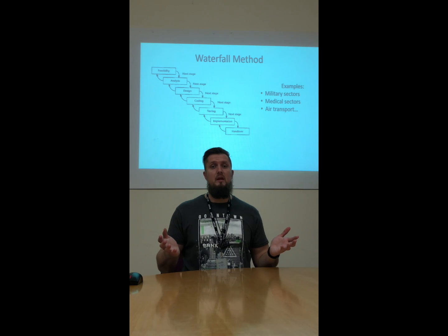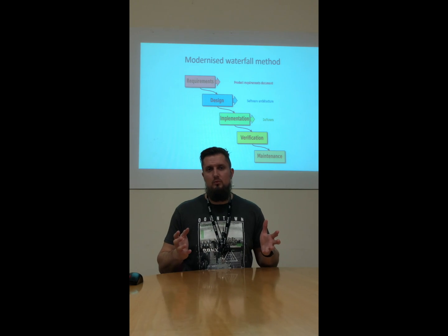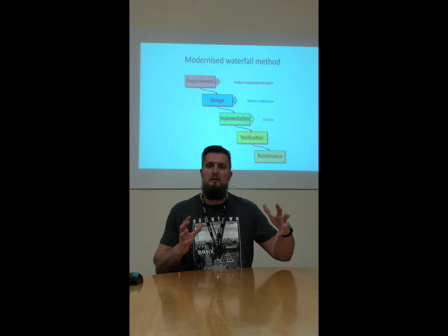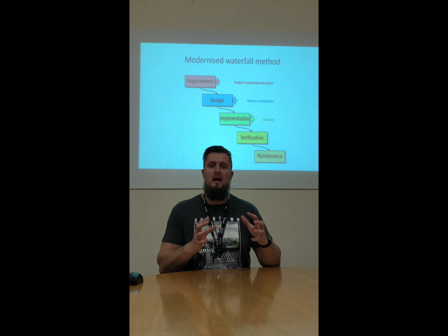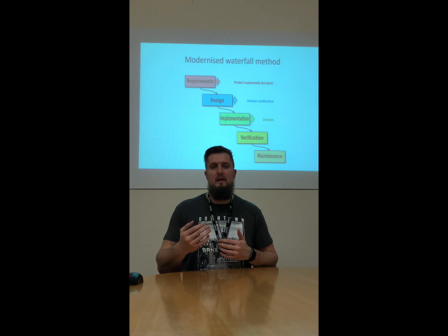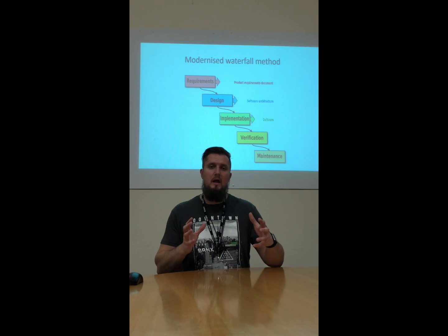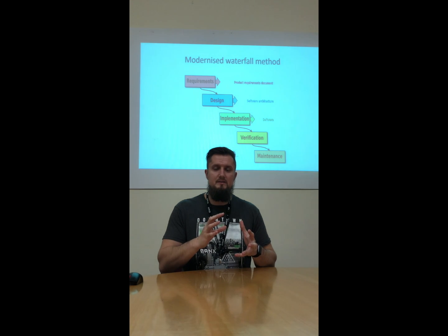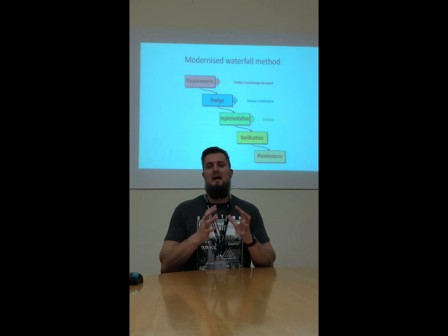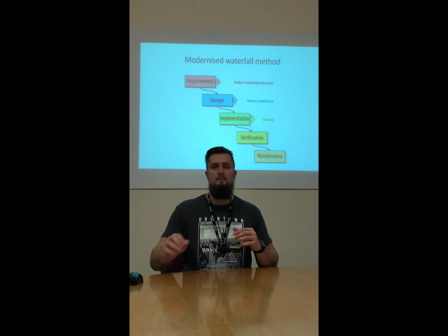This is a more modernized waterfall method where the requirements are bundling up feasibility and analysis. The design stays the same, implementation is where the code happens, verification is the testing phase, and then the maintenance is included in the handover.